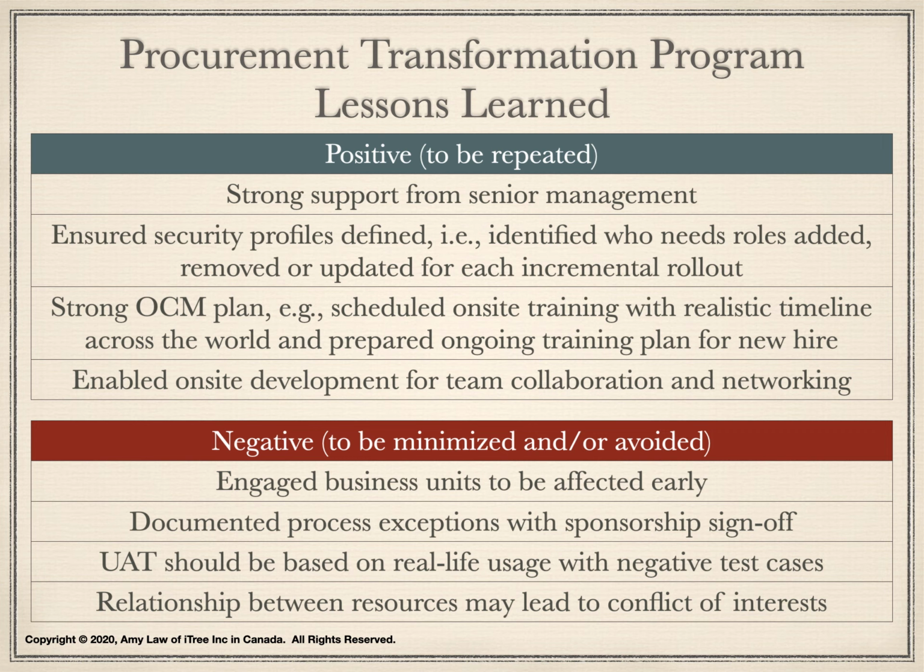We had a strong OCM plan, and we scheduled training with a realistic timeline. We visited users and provided on-site training across North America and China. We were grateful that the project budget enabled the hiring of a trainer and covered travel expenses. We provided certification after the training. Only the users who were trained could be granted access to the new tool. We also created an ongoing training plan for future new hires.